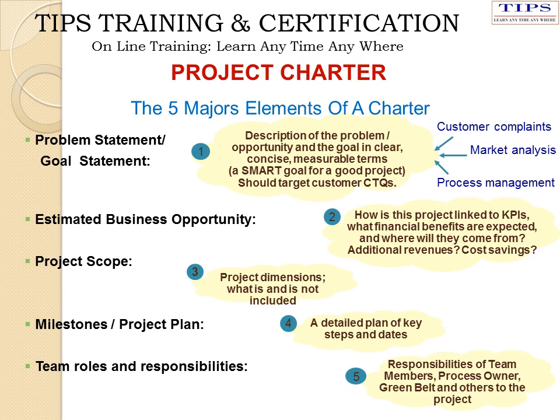While preparing the project charter, five major elements need to be considered: one is the problem statement or the goal statement, second is estimated business opportunity, third is the project scope — because you have to carry out the project within the specified time — fourth is the milestones or the project plan with a detailed plan with key steps and dates, and fifth is the team roles and responsibilities.